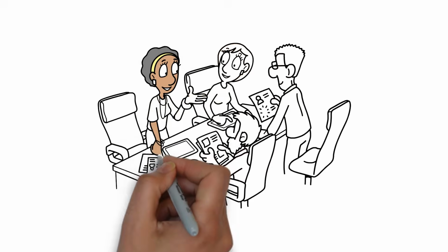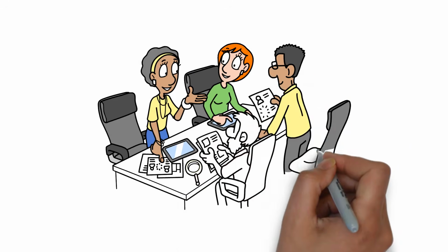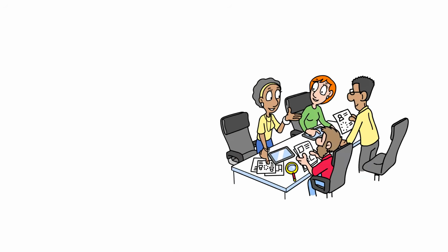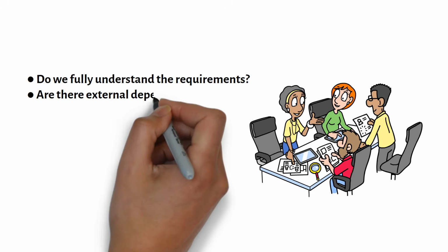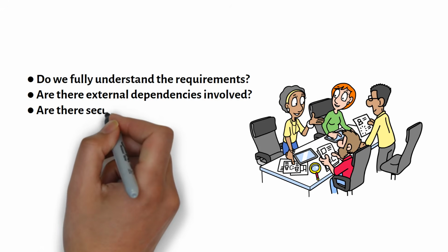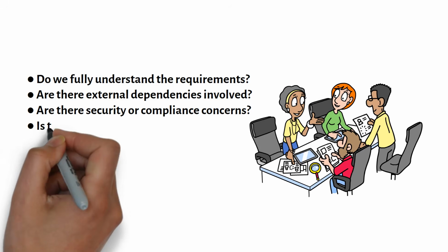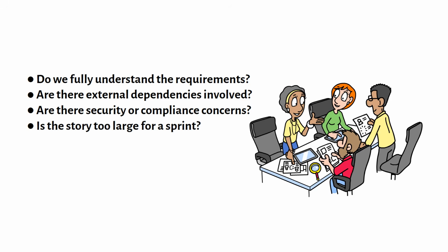During backlog refinement, the team works together to better understand the story. They may ask questions like, do we fully understand the requirements? Are there external dependencies involved? Are there security or compliance concerns? Is the story too large for a sprint?